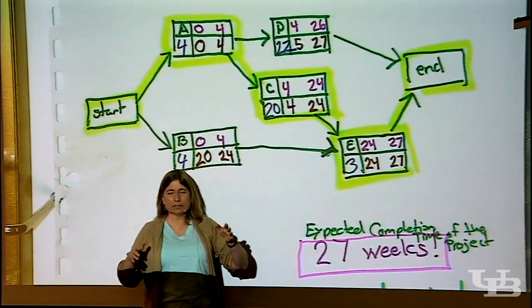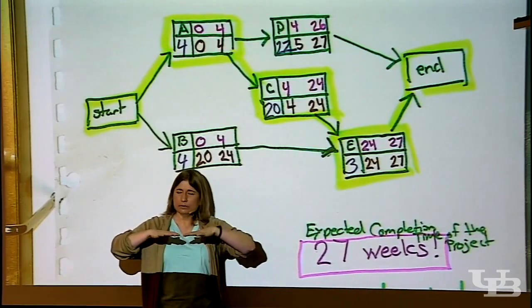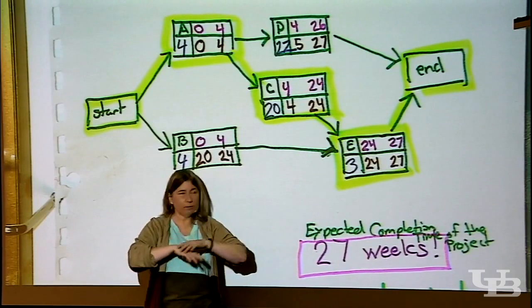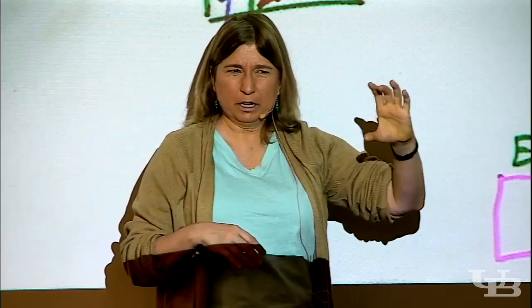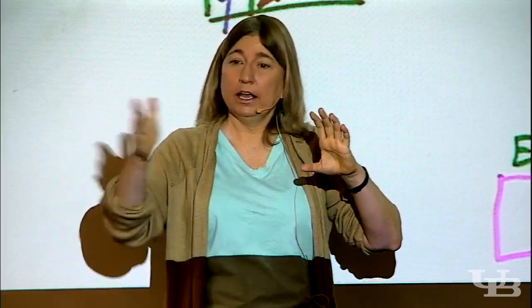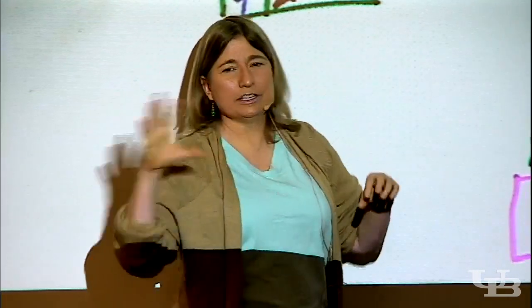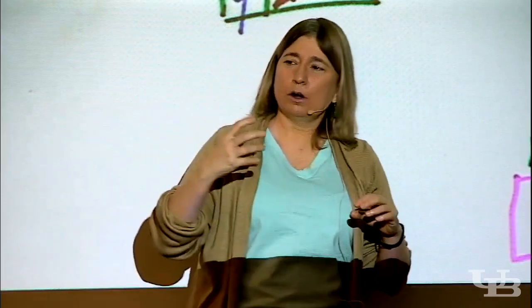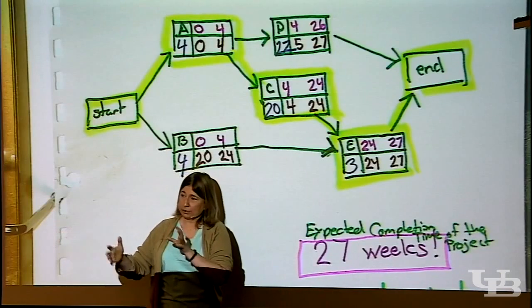Remember at the beginning we said, PERT and CPM, the graduation problem and this little movie problem, are 80% the same thing. All that is the same there. PERT's got a little bit of extra at the beginning because it's got that business about I'm not sure how long the durations are, so I get the three estimates and I use the formulas to find the expected time. And it's a little bit different at the end. It has an extra module for gauging the risk at the end. We're to that point. We're to that extra module.